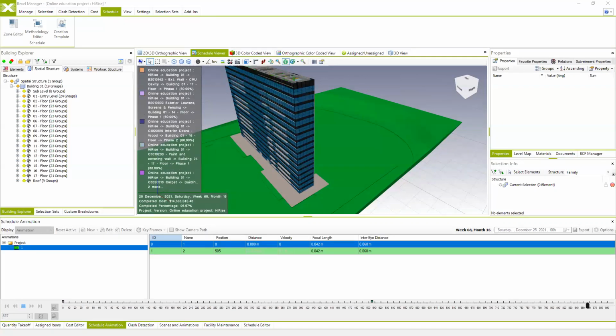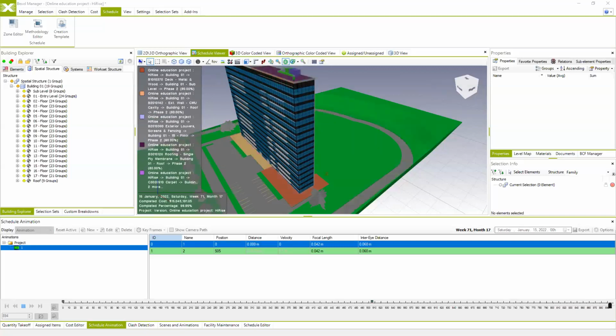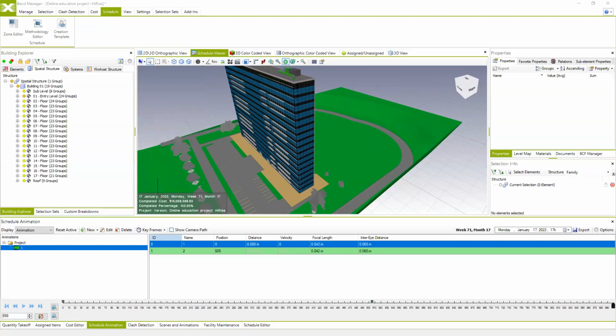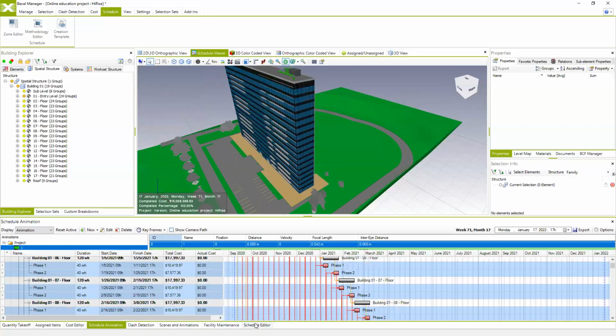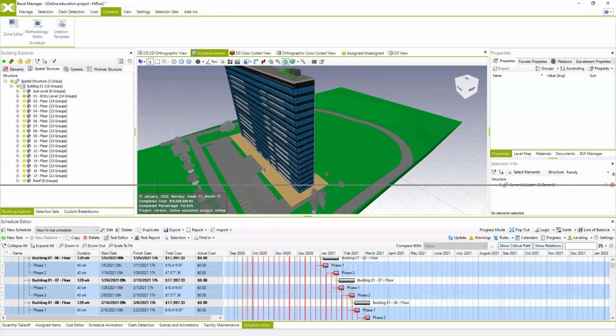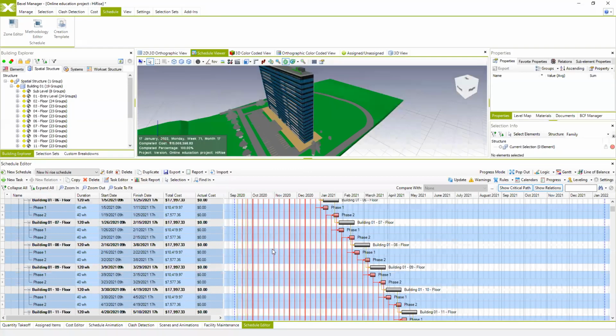What about elements that must be planned not by level, like facade or curtain walls that you mount by facade, not by level? Of course, you can do that as well. So you can specify these as specific zones, which will not be related to your levels. And of course, I just presented the best workflow, which creates the most efficient schedule.